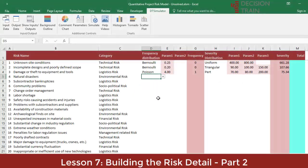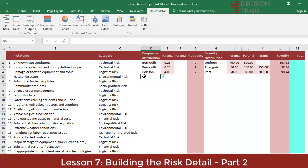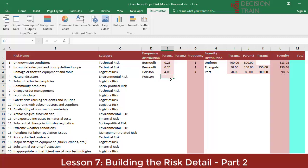The fourth risk of natural disasters is similar to the previous one. By admitting that it is a risk that could occur more than once during the life of the project, you should also use a function that allows more than binary frequencies. Assume that the disaster expert claims that there could be, on average, two or three natural disaster events during the duration of the project. We insert a Poisson distribution with 2.5 in its only lambda parameter.